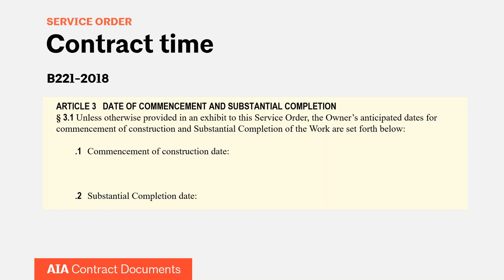Contract time is an important clause in the service order. It allows you to establish the time for performance, written in a way very similar to the B-101. This allows you to establish at least the date for commencement of construction and substantial completion. If you want to add more detail about the various phases and time for completion, you can do so by referencing a schedule, which is usually advisable as well.